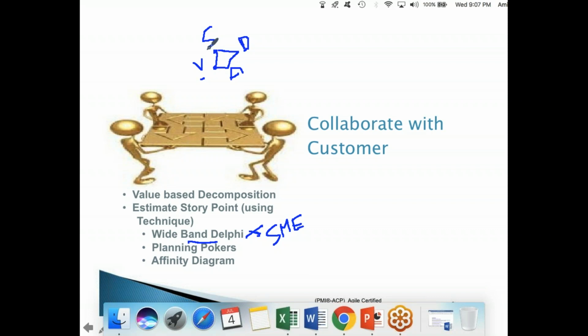I will keep on clearing the doubts. What doubts do you have? Right? Someone asks, hey, this apple, has the skin been peeled, or do we have to peel the skin? Someone asks, should I climb the tree and get the apple and then eat it? Someone says, is it cut into pieces? Is it de-seeded and given so I should consume it? And what is the size of the apple? Is it a small apple or a big apple? So till the time I reach consensus, I'll circulate the information, getting more or less close to consensus. Initially Sachin said eating apple is 20, Dhoni said eating apple is 5, someone said it is 9, Virat said it is 2. So there is some lack of clarity in the requirement. What I will do is gather the information and clarify the requirements.